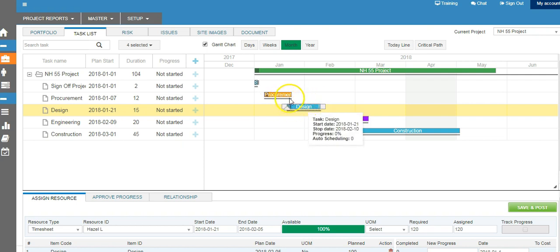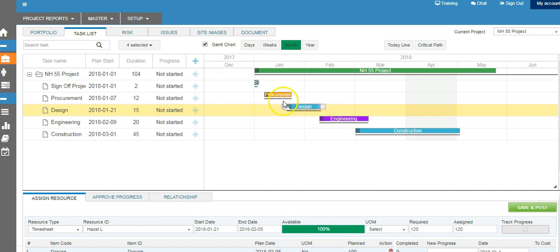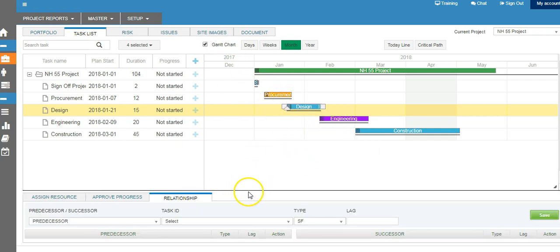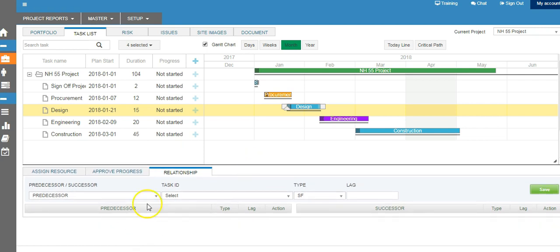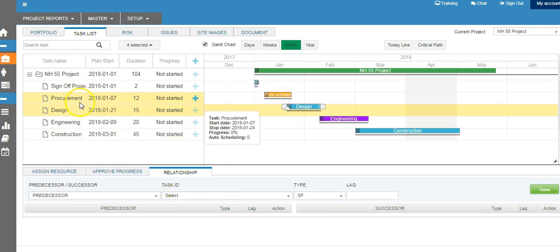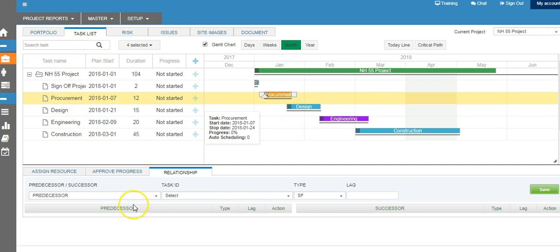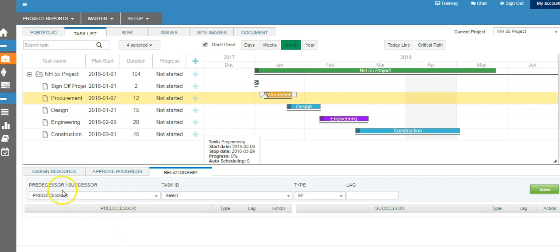Before we move these bars, let's try to connect them. How do we establish a relationship between the bars? This is also shown in the relationship tab underneath. When you click on procurement, you will see the predecessor and successor — currently there is no relationship.